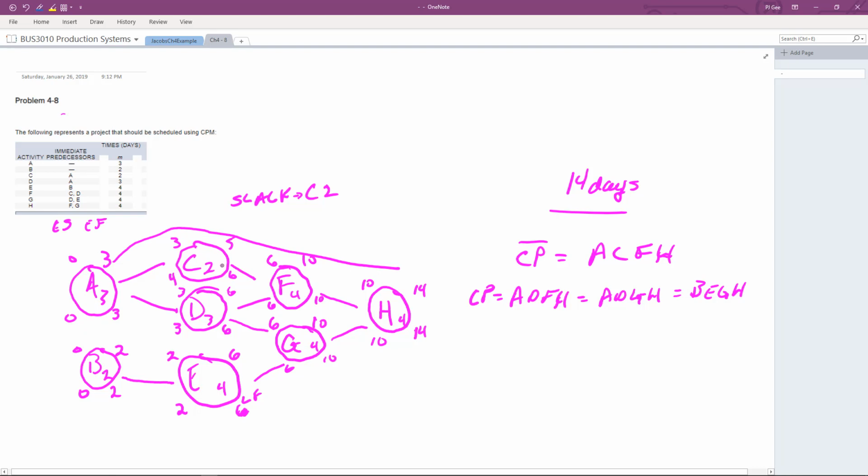So the whole concept, let's break back out of that. Let's say it again. We could either start at week 3 or week 4. If we have a policy to start everything the earliest, we would start it at week 3, so that people were sitting around for that last week. Just to give an example of what really happens, people aren't usually sitting around waiting for things to happen, but we can start it as early as 3, or as late as 4, and we can catch up to the other processes that are full bore. There's no wiggle room, there's no slack time in there.